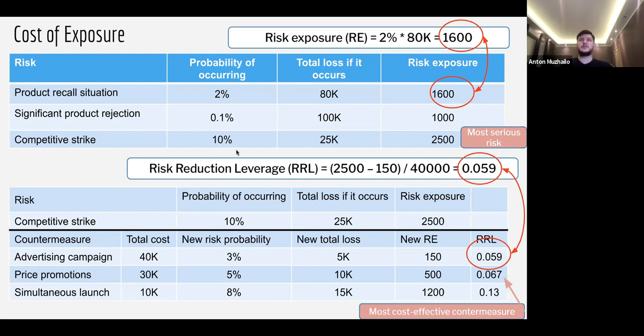In marketing, it's usually pretty clear because they have the surveys, they have the dynamics, the coefficients, etc. What we can do with the product risk estimation is basically track how often the related defects are happening. For example, if we're talking about performance testing, and we have only 1 or 2 defects found within a release related to performance, then we can say, okay, the probability of occurring is low.